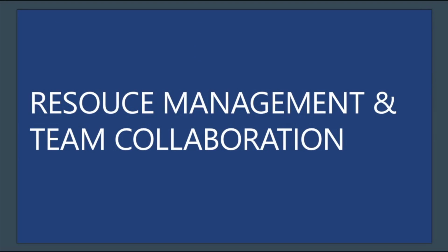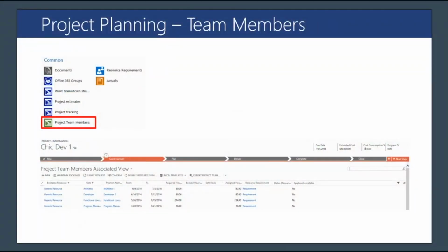Now that we have our planning set up, we can begin to staff our project. The project template that we previously built comes along with a virtual team that we can staff. And we can see here from this view that we have a couple of generic resources set up where we have some spots available to begin staffing our project.